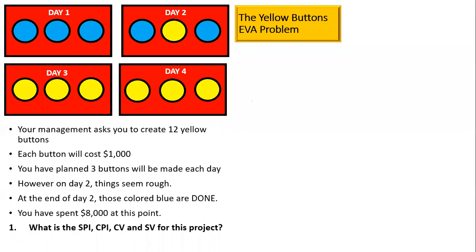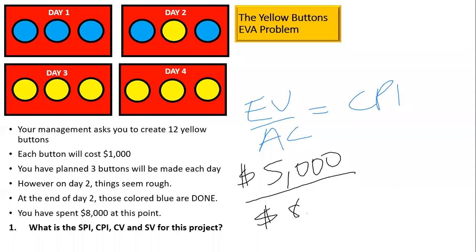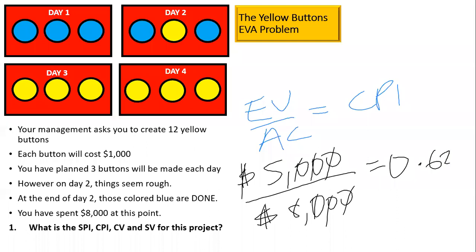Earned value divided by actual cost equals CPI. We have $5,000 divided by $8,000. Remember, the dollar signs are always there in these indices, but the dollar signs cancel and the zeros cancel, leaving 5 divided by 8. And if you follow through with that, 5 divided by 8 is 0.625. So the answer to this problem is 0.625.